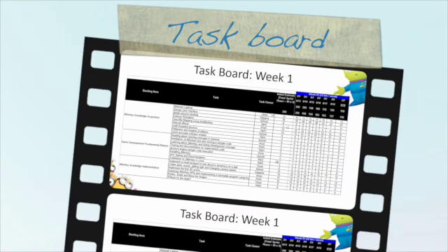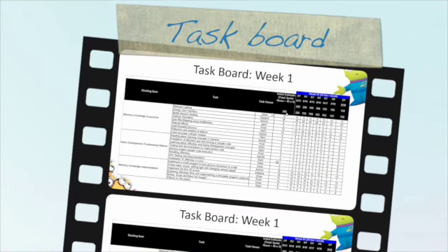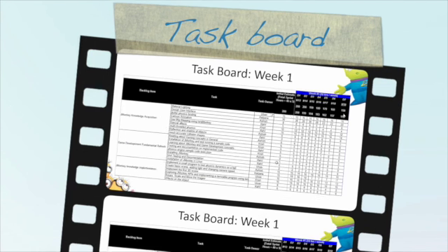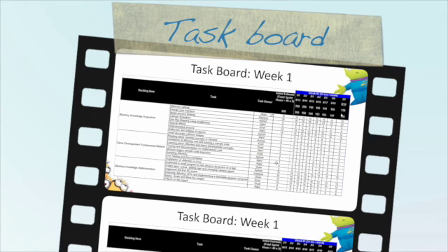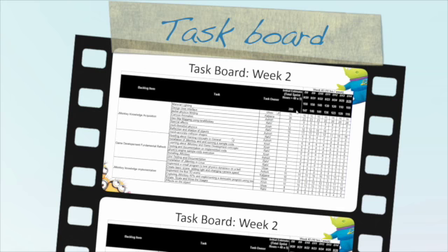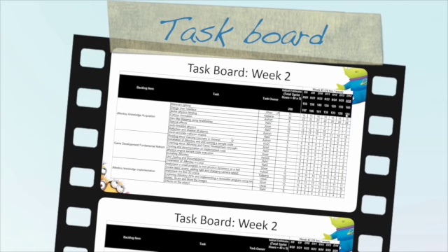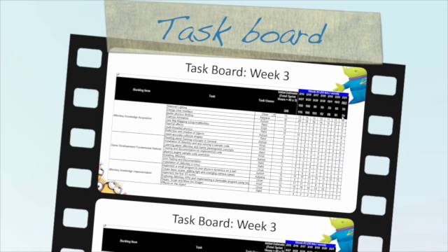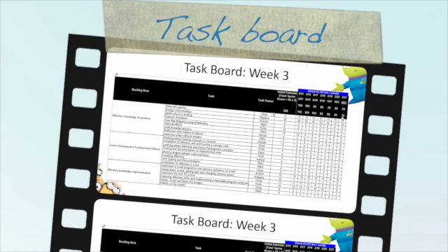For sprint 1, we see a total effort estimate of 200 hours to be completed in 4 weeks at 50 hours per week. Week 1 task board shows the proper 50 hours being burned down by the team, but in week 2, we see a fall in the progress by 16 hours. Again, in week 3, we see only 37 hours of work being done, creating a significant lag of 29 hours.